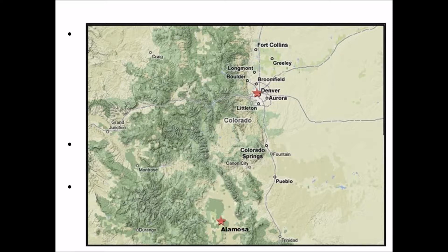It's based on a set of structured discussions with public health leaders and key staff and the stakeholders involved with the response. It involves a neutral facilitator and a no-fault approach, and during this facilitated look-back discussion, which takes maybe a half day or so depending on the complexity of the issue, you go through each of the major decision points and issues, and you discuss the dimensions and probe the nuances and understand what really went well and what didn't go so well.